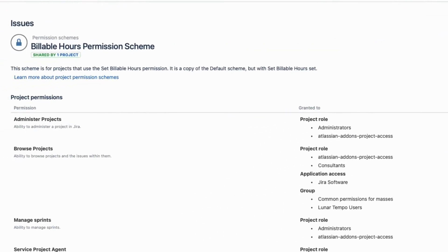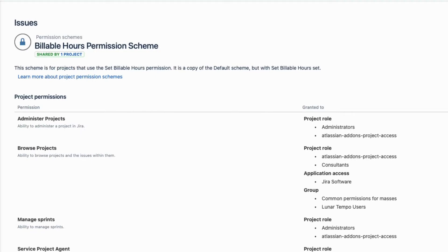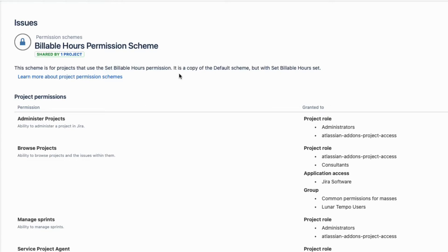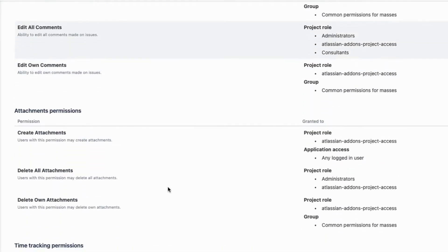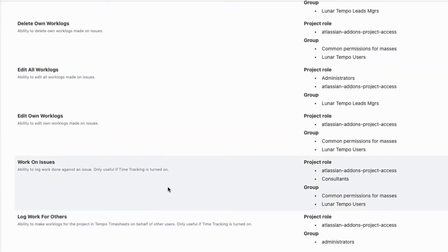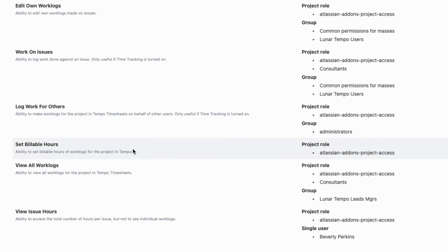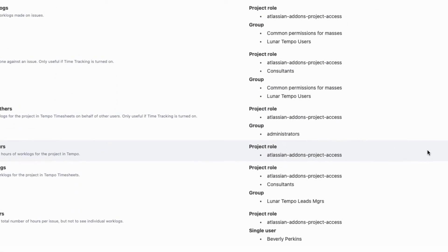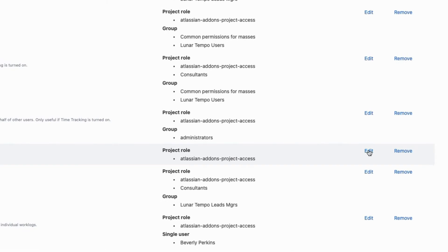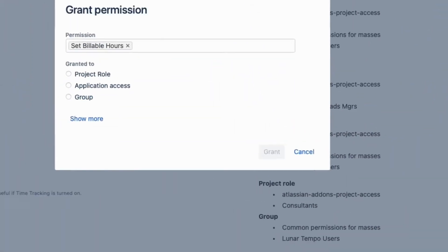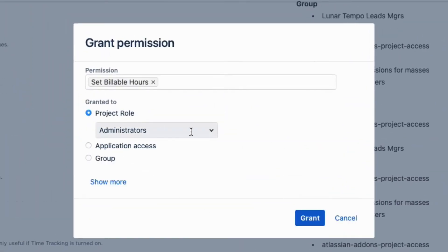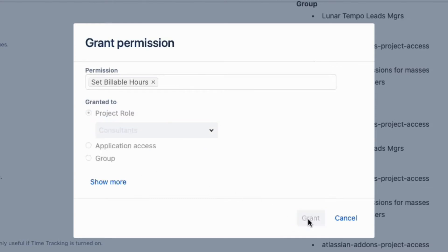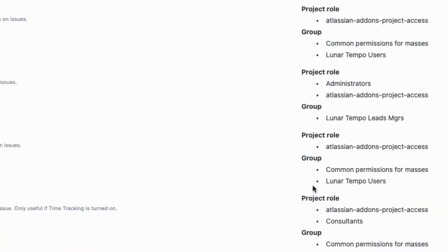I created this permission scheme to be used only for projects that need to use billable hours. Having a separate permission scheme is a good way to control which projects can use the Set Billable Hours permission, and keeps it separate from the Default Permissions scheme. I'll scroll way down to the Set Billable Hours permission, and I'll grant it to this project role called Consultants, which contains those of us who are working on this project.